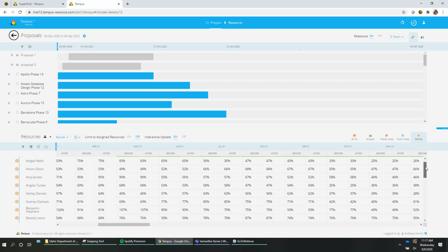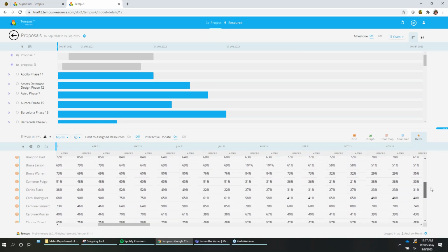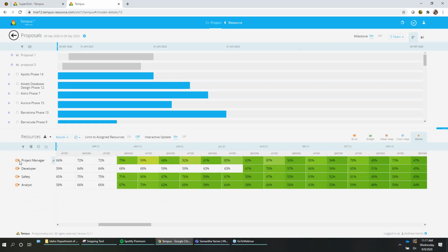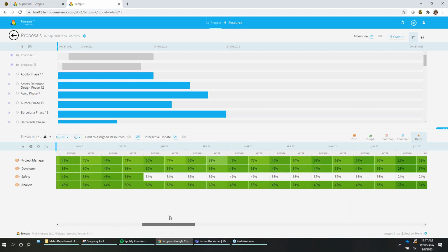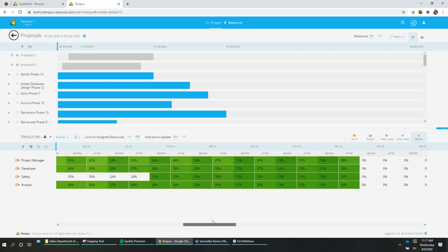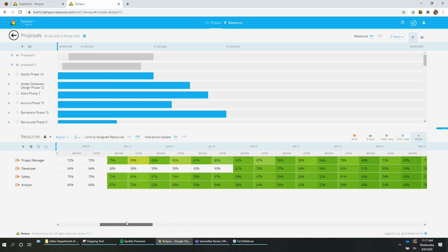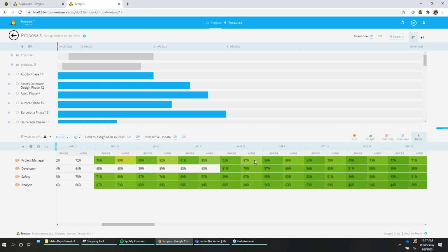Again, for project manager, if I open this up, it's going to give me a list of all the project managers in the system with their current allocation. This is a roll-up of all of their allocation overall from the team standpoint. It looks like I have enough capacity from all of the teams that have gone up to indicate that I can actually have this project without either removing other projects or adjusting in-flight projects to put them on hold or cancel them entirely. So it looks like I have enough capacity to include that.